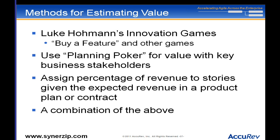For estimating value more precisely, I highly recommend Luke Hohmann's book 'Innovation Games.' He's got great games in there like 'Buy a Feature.' The basic idea — the one he uses at conferences — is you design a set of internet-enabled sunglasses, give customers some play money, and say which features do you want? You have prices for the features, the customers spend their play money, and you figure out there are different kinds of customers in your base who value features differently. It's a fantastic way to figure out how your customers value things.